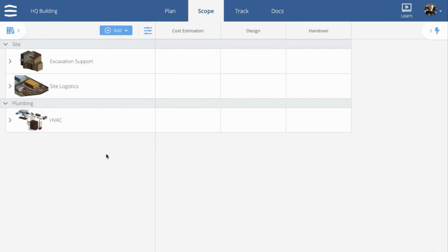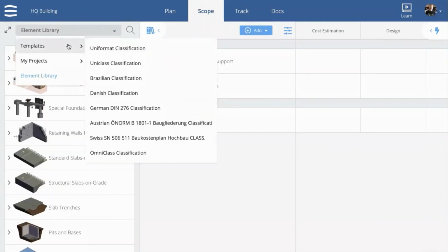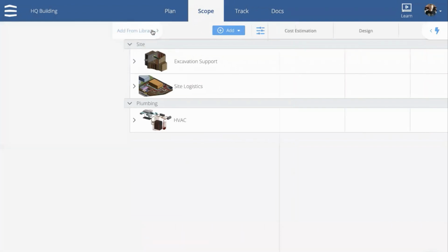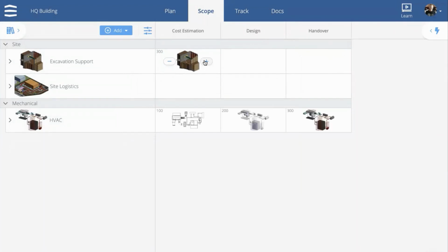I've created some content. We've put it in folders. You can have an industry standard folder structure, such as Uniclass, Uniformat, etc., but just in the interests of simplicity and keeping it quick. Now we would see for each of these milestones what we would like to add. I'll add using the add tool, and then I can increment what the requirements are as far as the geometric requirements, the reliability requirements for each of these, and we can start to show what we want at each stage.